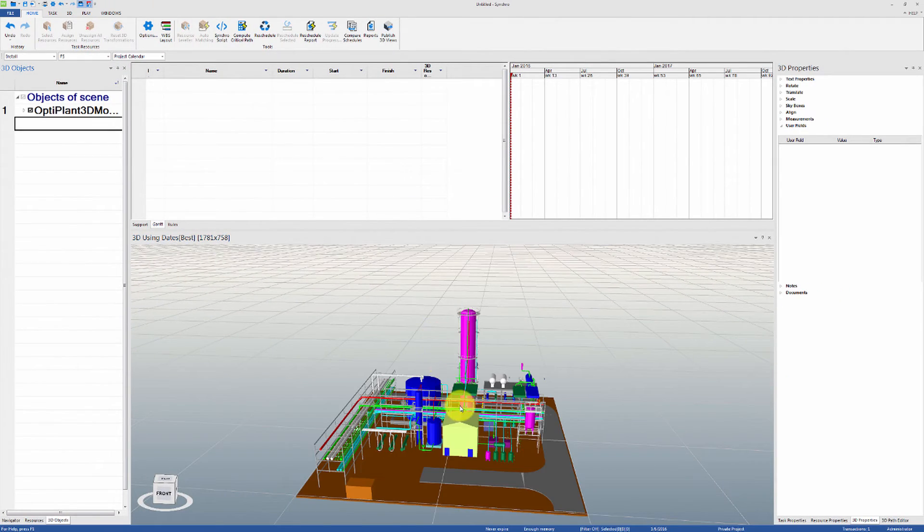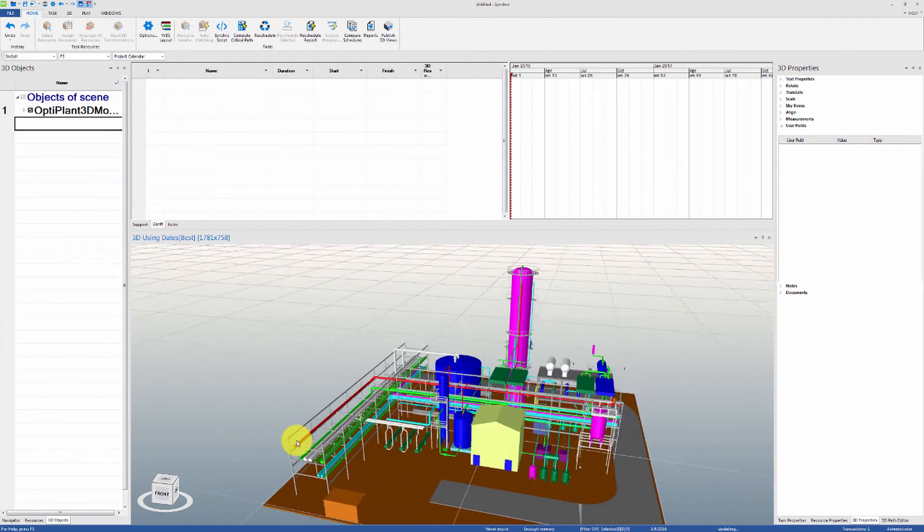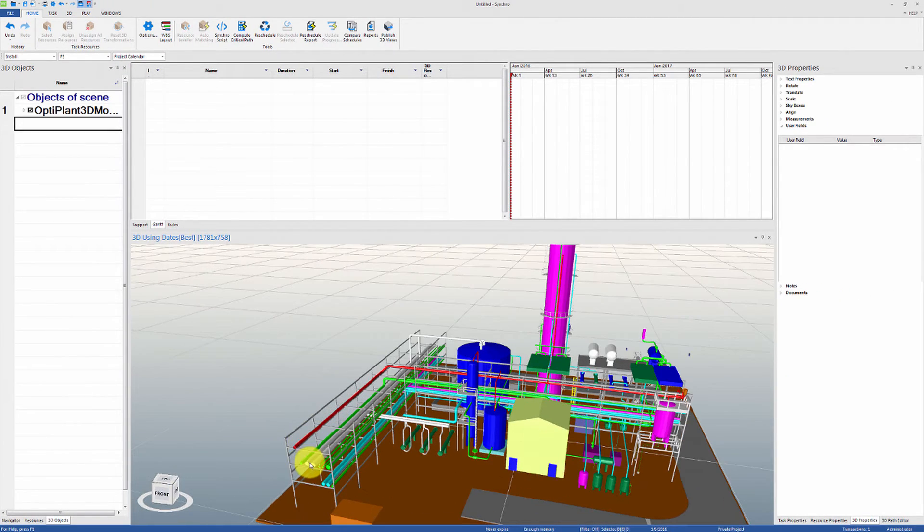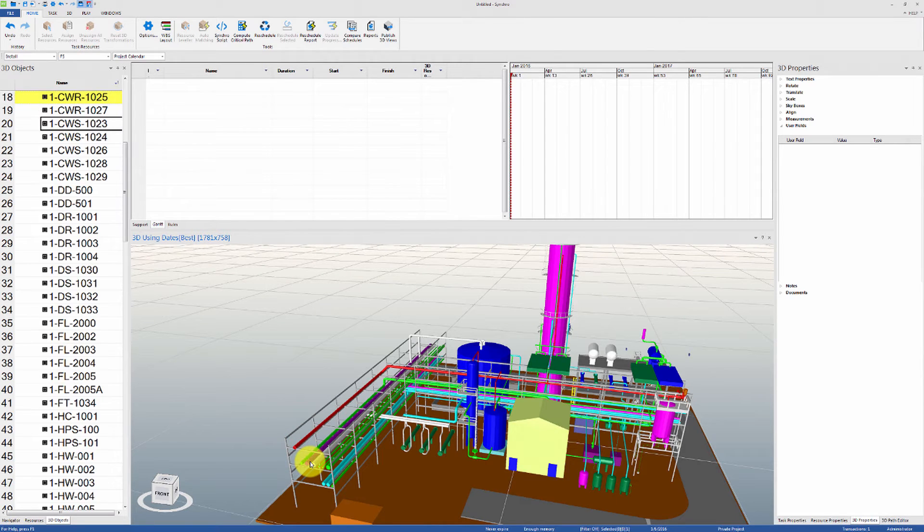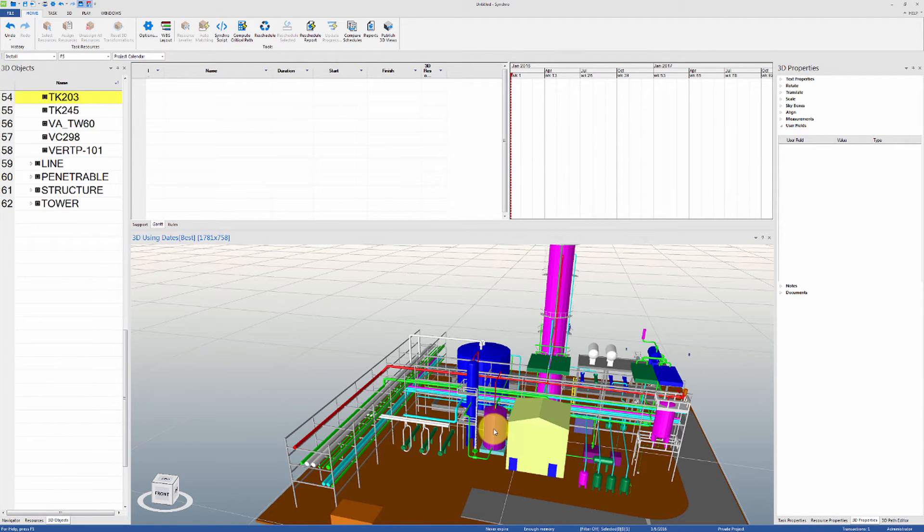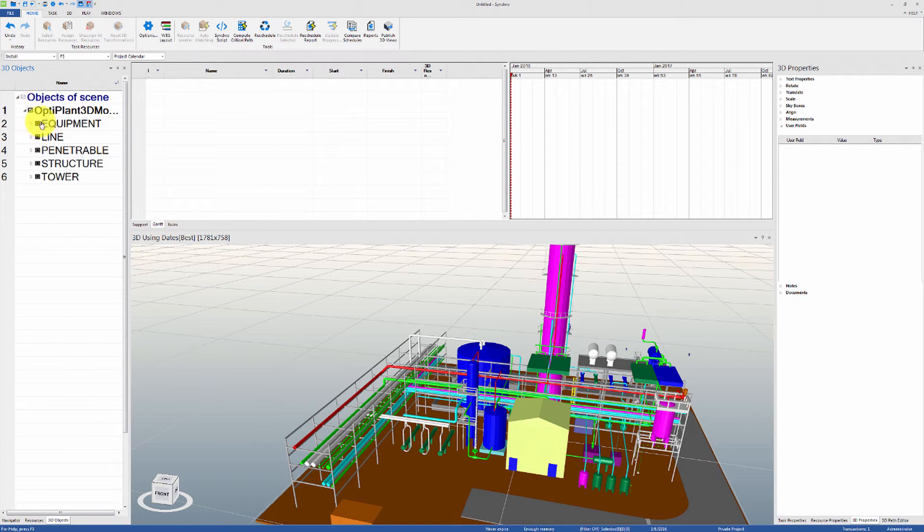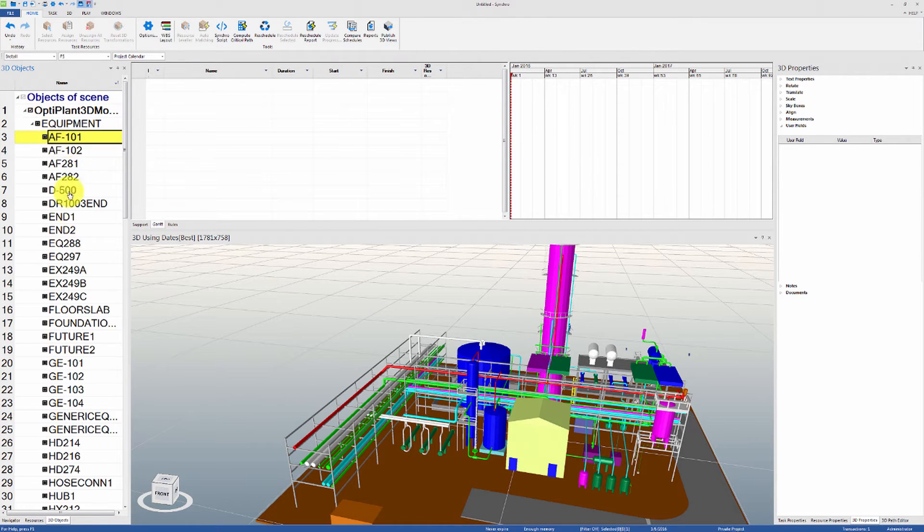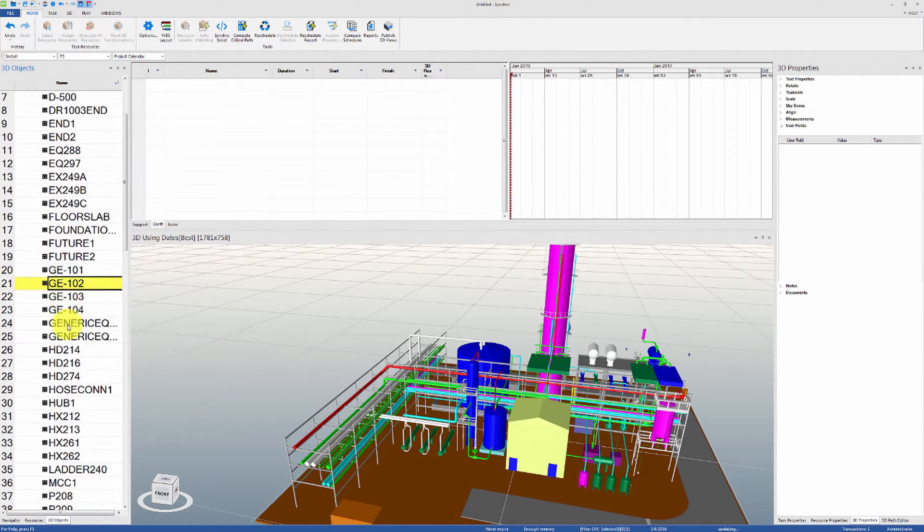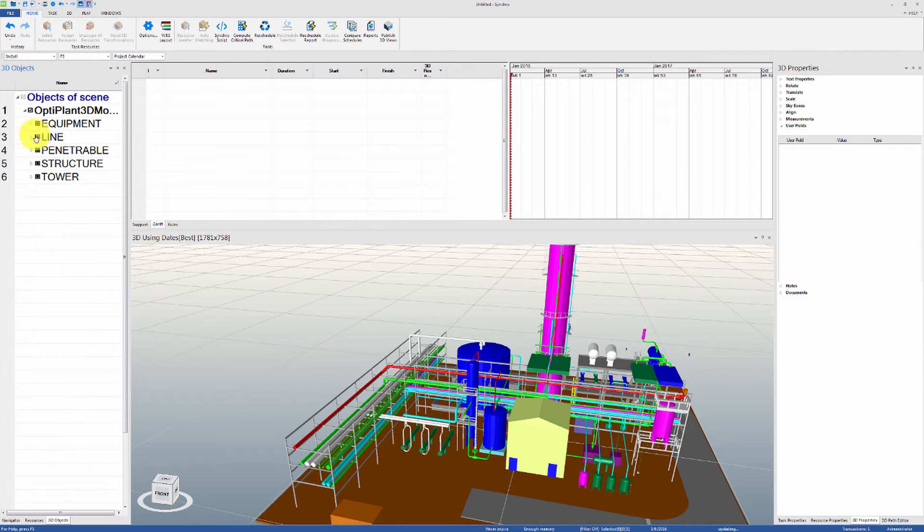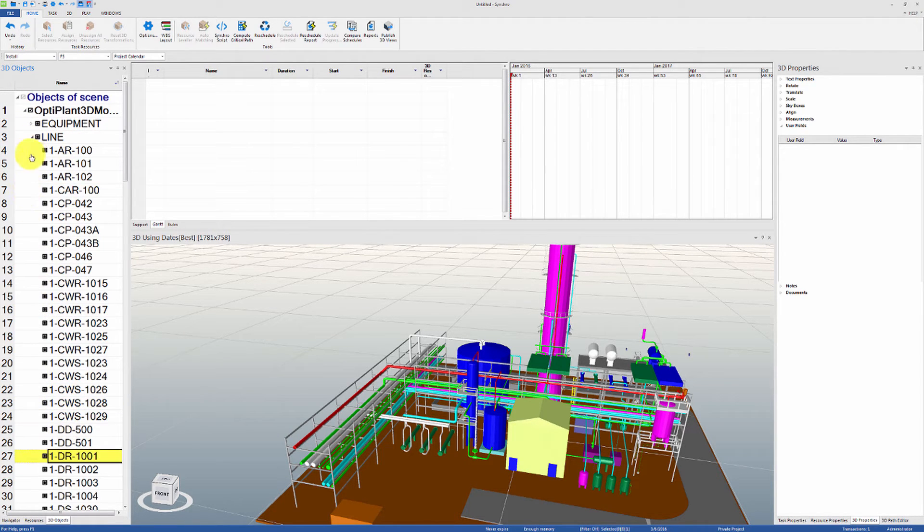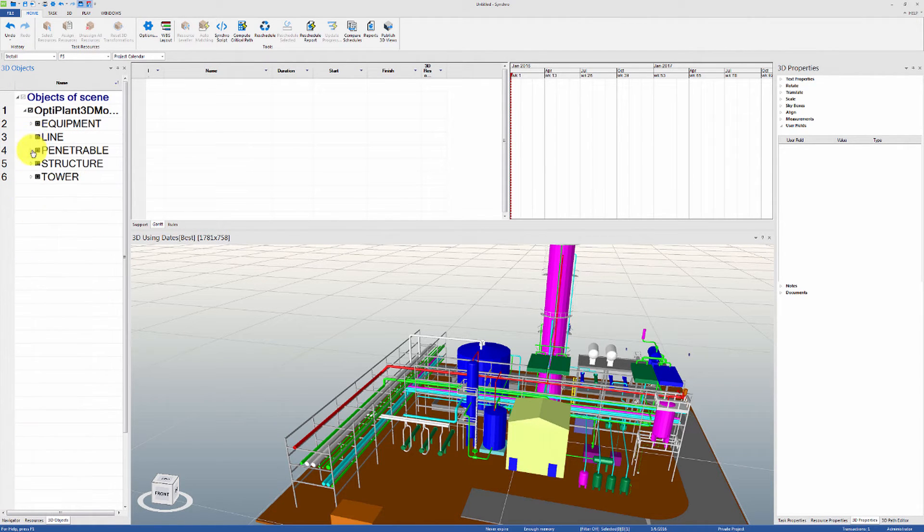Now you will notice that the level of detail is suitable for 4D planning. We can subdivide the pipes, for example, within Synchro into spool sections if required. Also note that you can always import the model by parts if different levels of detail are required for different sections, for example, if the steel structures need to be more detailed than the tanks.